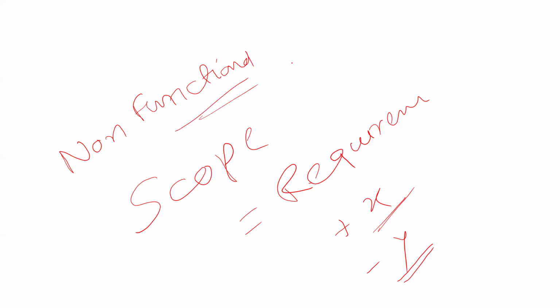NFR, non-functional requirement. Vishakha, basically he is a bank guy, he doesn't understand that if 5,000 users log in, currently the system will crash. It is your responsibility to guess and write that the system should take 5,000 users, and design it that way.